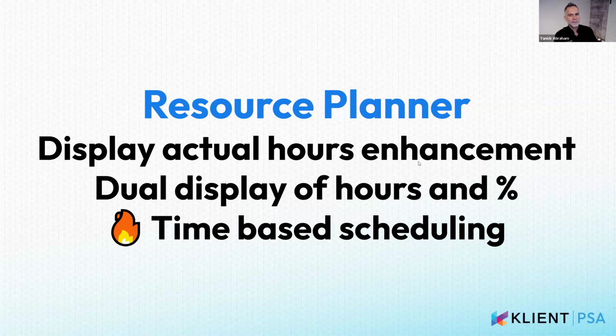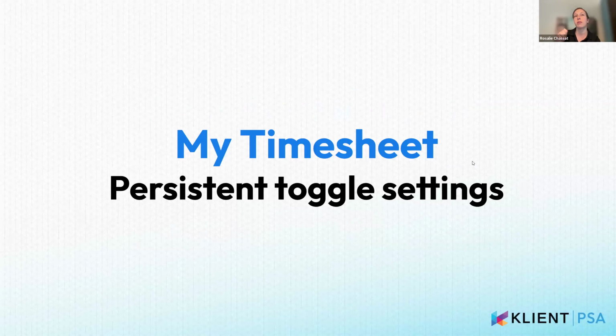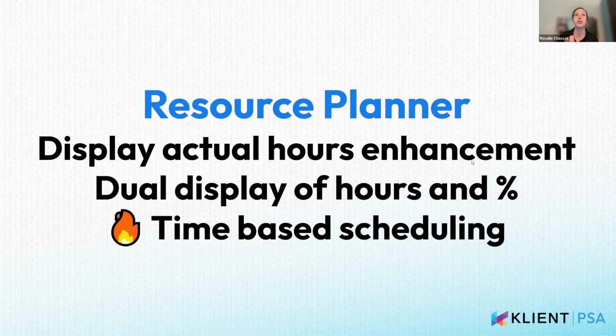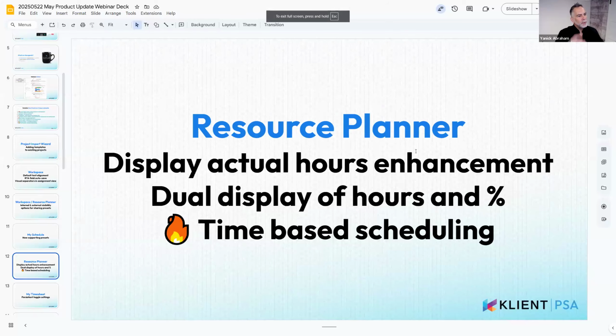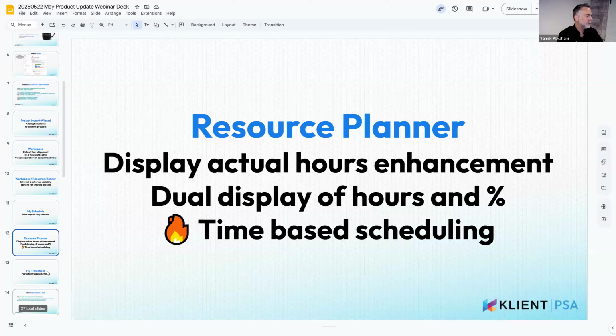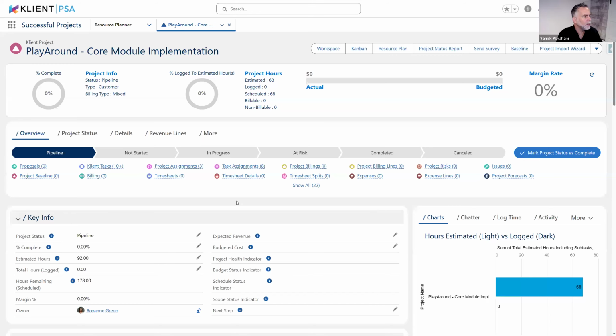So now they're coming. Yeah, and if you want to leverage that checkbox for the time off and the holidays, then make sure that in your org you actually configured your time off and holidays. Not everyone is using that, but if you want to use that checkbox, you would have to do that first. And I didn't explain the behavior if you uncheck it. If you uncheck it, it's still going to plan hours on the days that you're off.